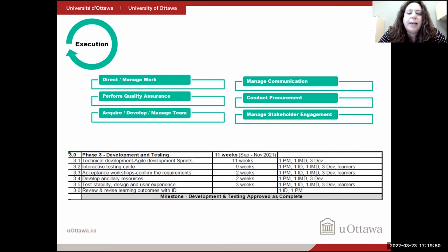This is also where you might need to go back and update your original plan, especially in this particular project, which happened over COVID. There were many elements that obviously we weren't prepared for, in terms of test sessions could no longer be with many people in one place, or sometimes couldn't happen at all. And so then you have to not only develop the VR app, but now a computer playthrough so people can access remotely.